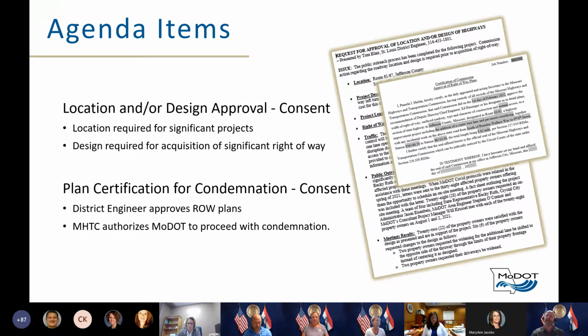The next item is plan certification for condemnation, which is also a consent agenda item. There are times that MoDOT must use eminent domain to acquire the necessary property to complete a project. This action must be approved by the commission. This action may be required even while right-of-way is still being negotiated to ensure the project stays on schedule. Right-of-way plans are developed by the district and presented to the district engineer for approval.